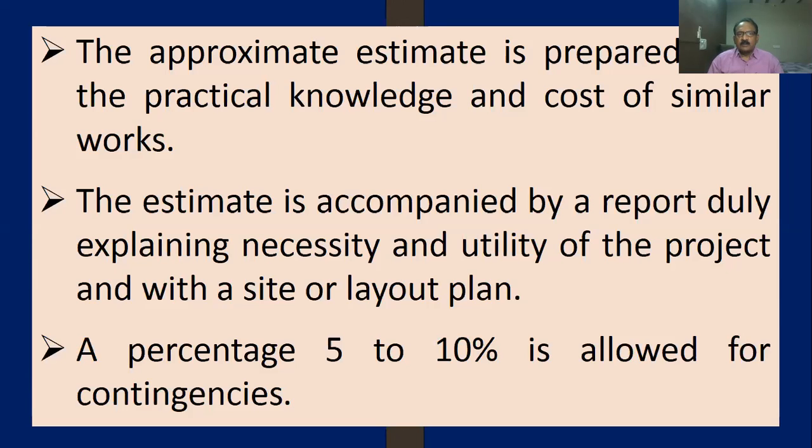Even a percentage of 5 to 10% is allowed for contingencies. Note down, this is one of the important points frequently asked.